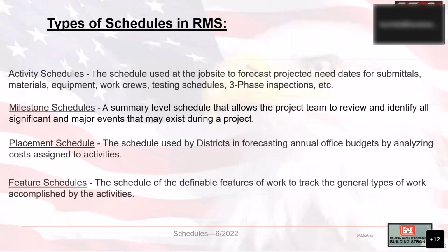Some work sequences of various trades occur repeatedly throughout the contract. Follow-on trades do not wait for the initial trades to complete before commencing the follow-on work. Different areas of the project are at different stages of completion within the sequence of work. Some contracts will have essential installations that must receive extra attention even when they are not on the critical path. Most of the activities may be very close to the critical path in terms of float time, since these activities closely precede or follow the activities on the critical path.